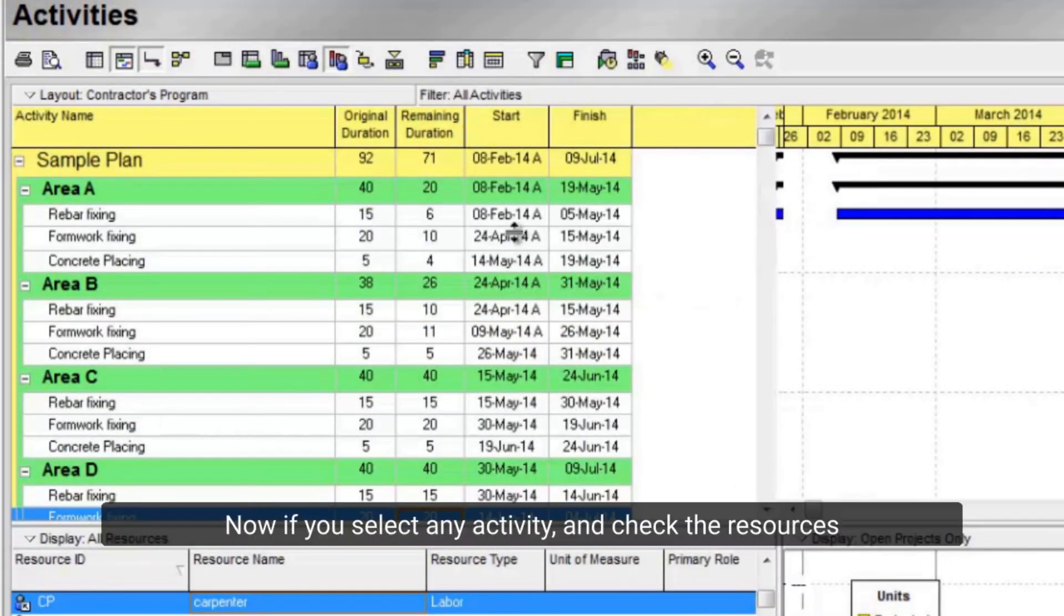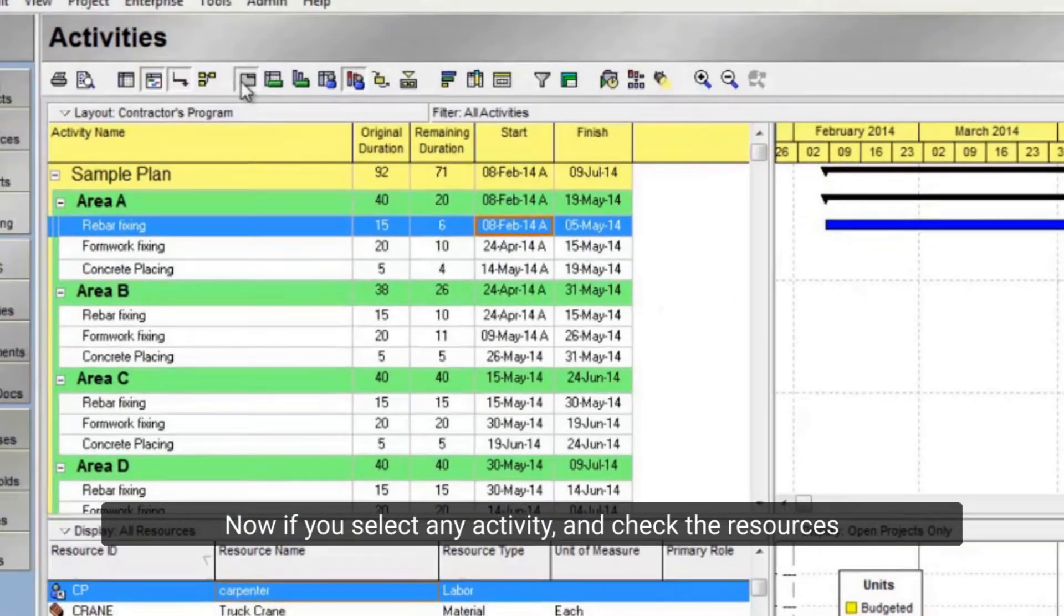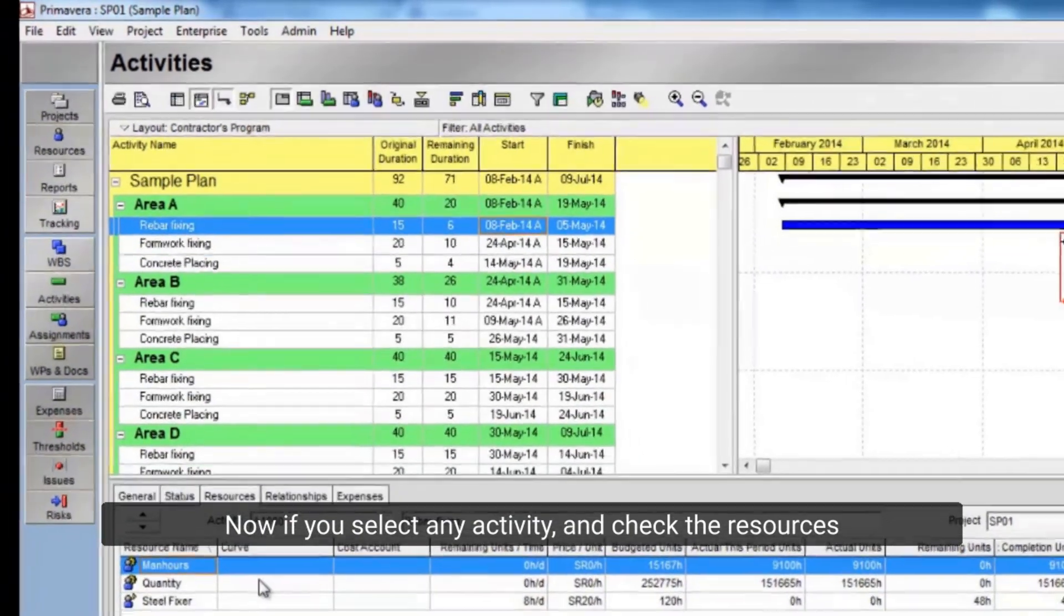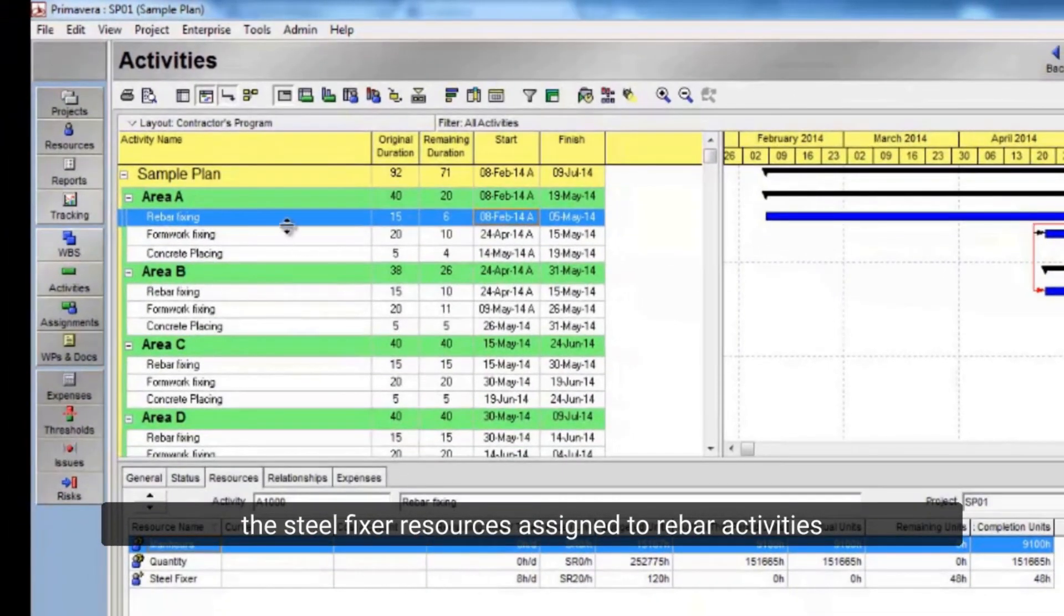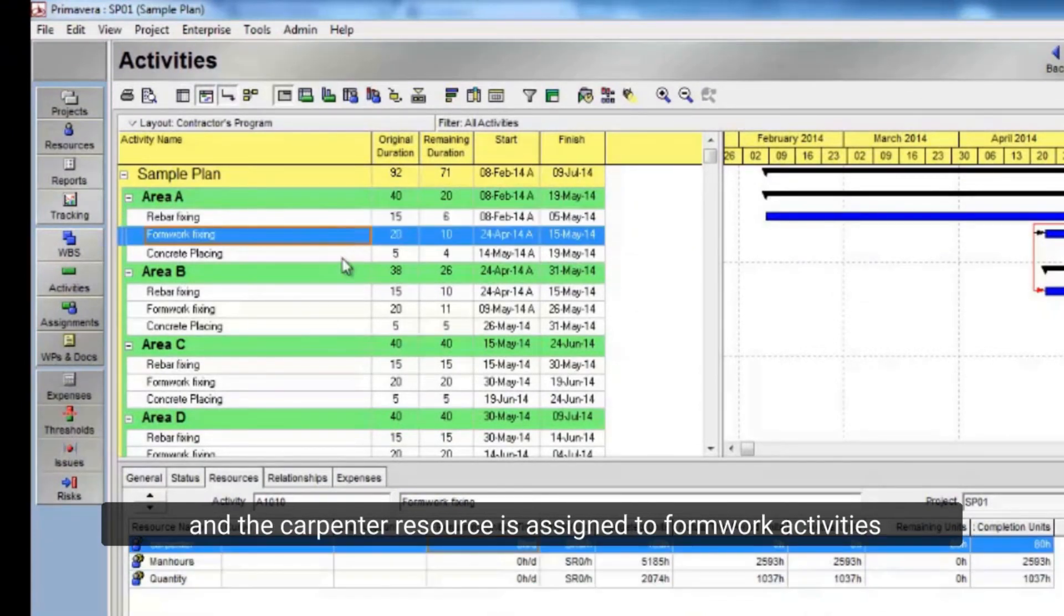Now if you select any activity and check the resources, the SteelFixer resource is assigned to rebar activities, and the carpenter resource is assigned to FormWork activities.